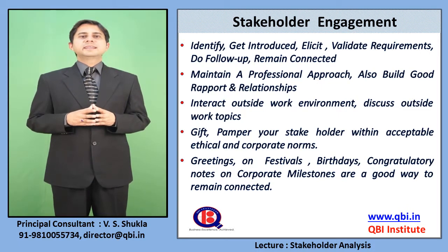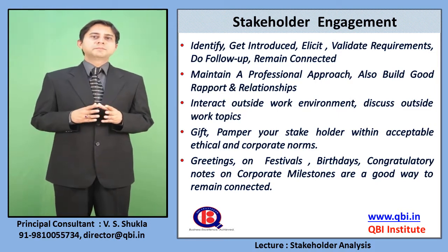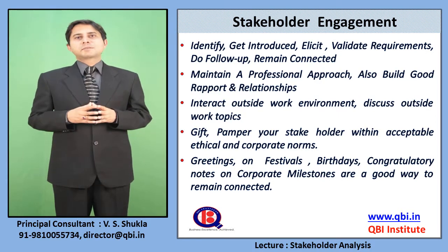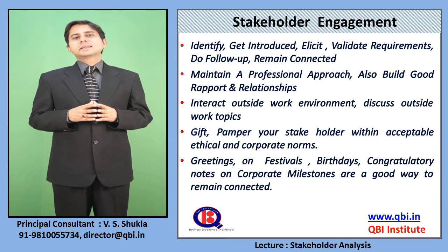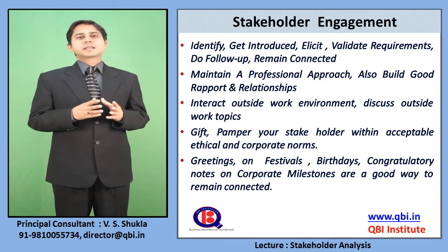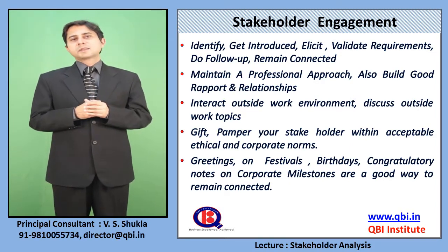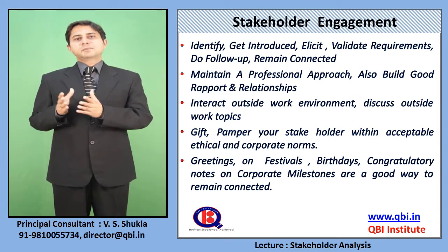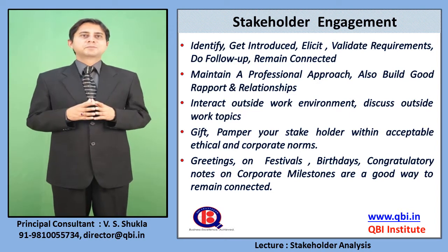Then you should proactively get introduced to them, elicit and validate requirements from them, and even when you are done with the requirements process or requirements activity, do a follow-up with them and remain connected with them, because you will need these stakeholders time and again. You may need them at the analysis phase, during the time of test management and execution, and project implementation, again you will need them. So you try to remain connected with them.